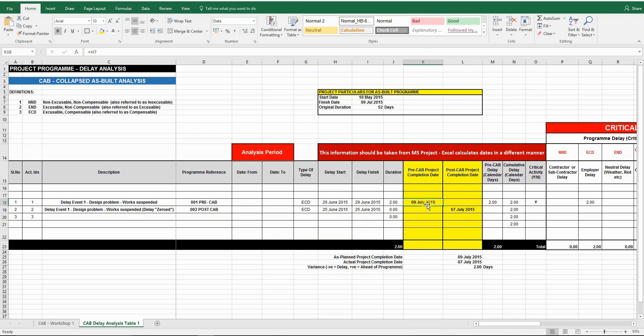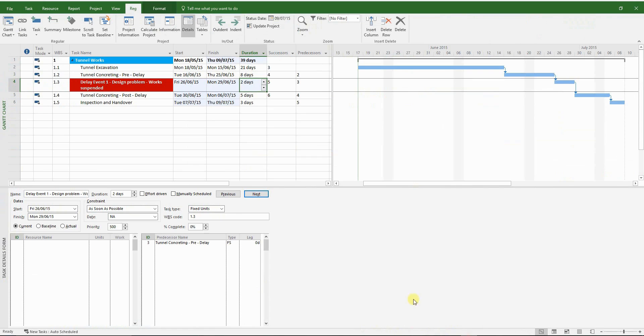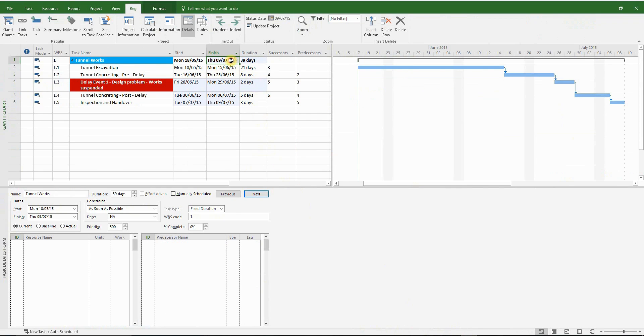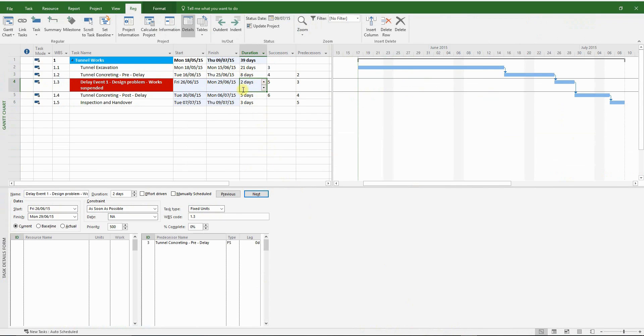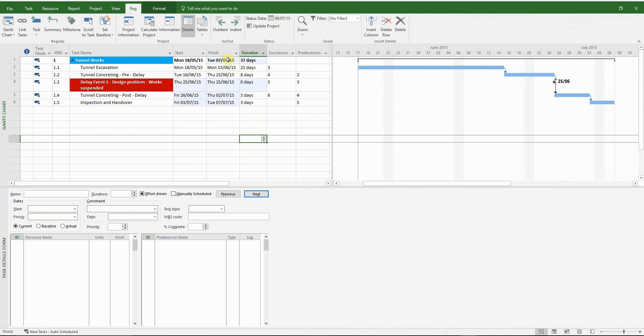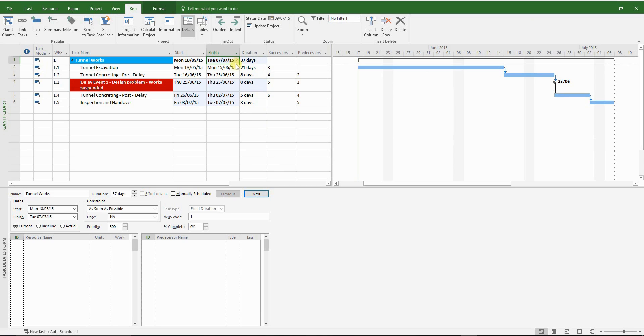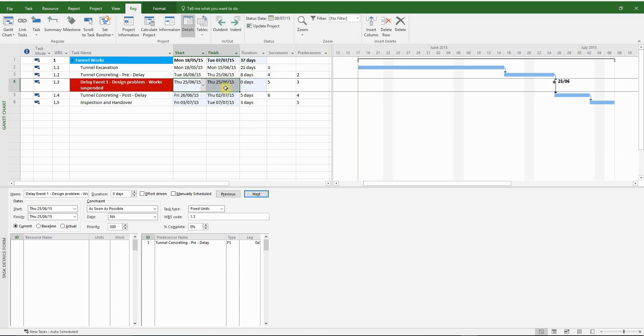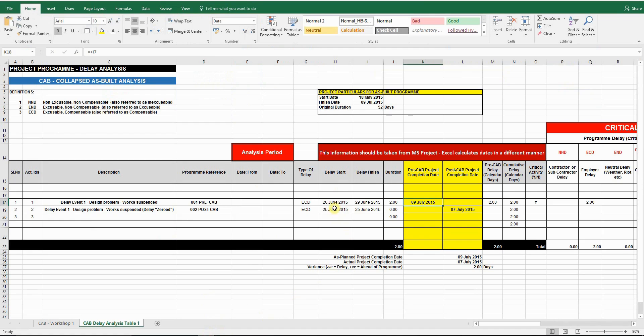I've already populated the table with the relevant data, including the pre-CAB and post-CAB dates, namely the 9th of July and the 7th of July respectively.